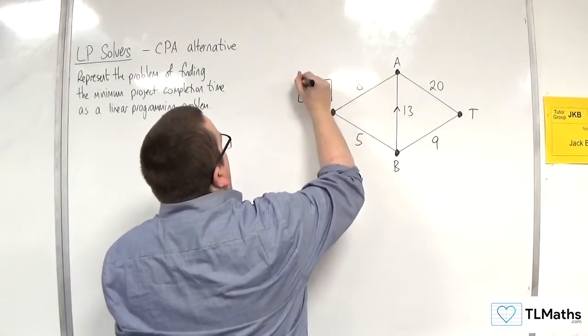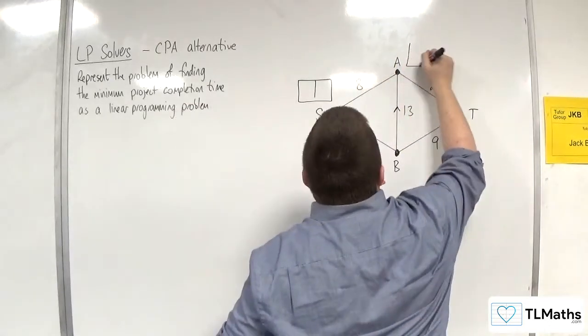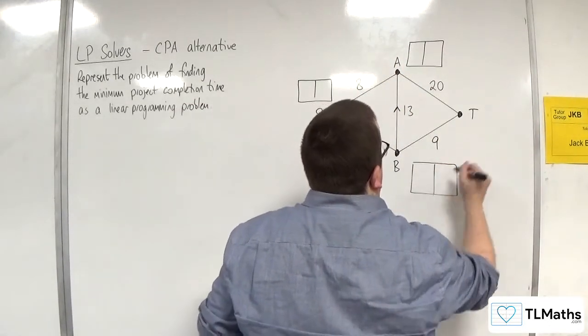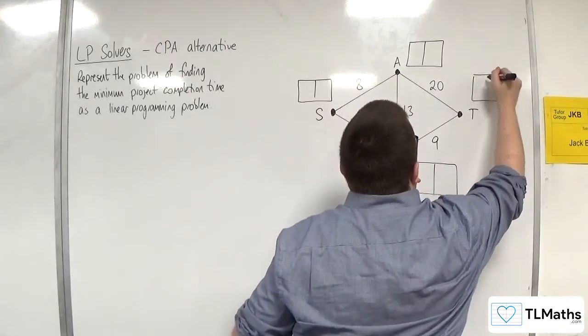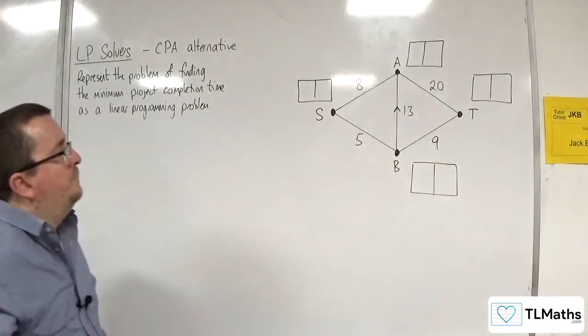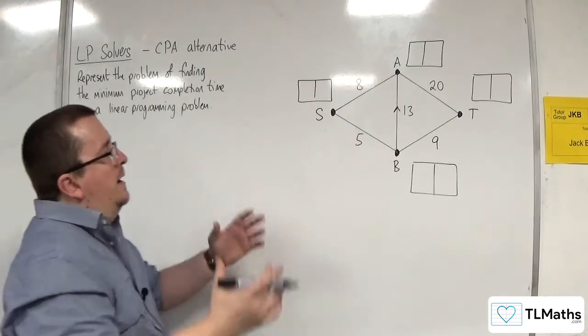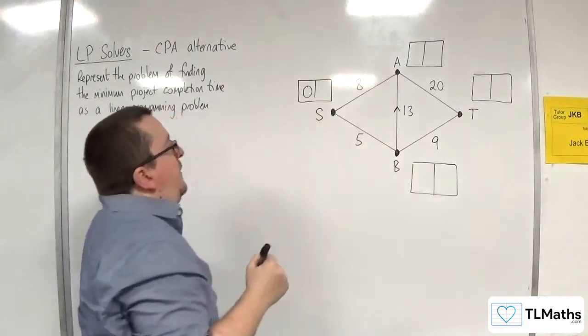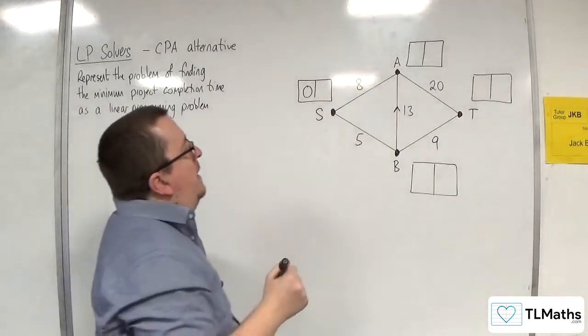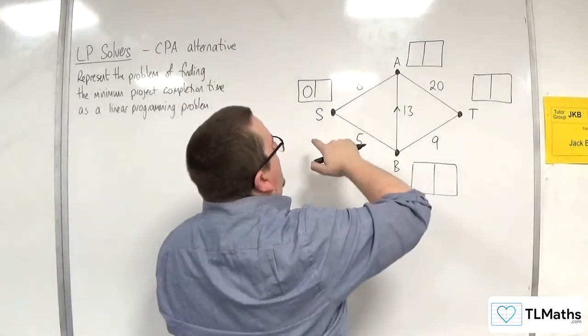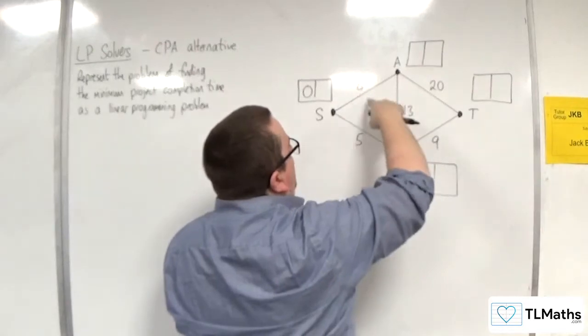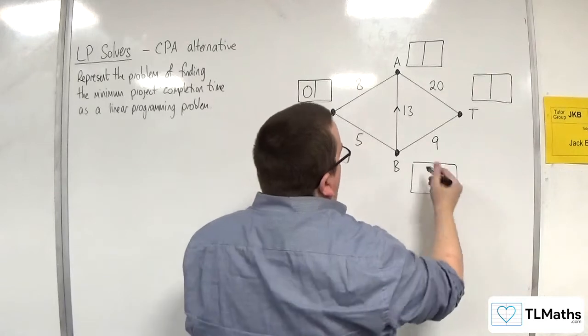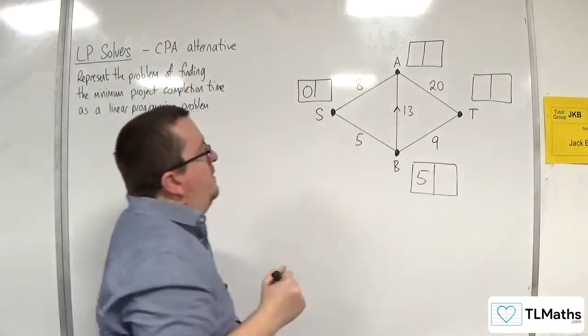I'm going to need a box for each of my vertices. Okay. So earliest event time first for the forward pass. That would be 0. Now, I don't want to consider that one just yet because I've got both the 8 and the 13 going into it. So I'm going to go down here. The earliest completion time there would be 5.